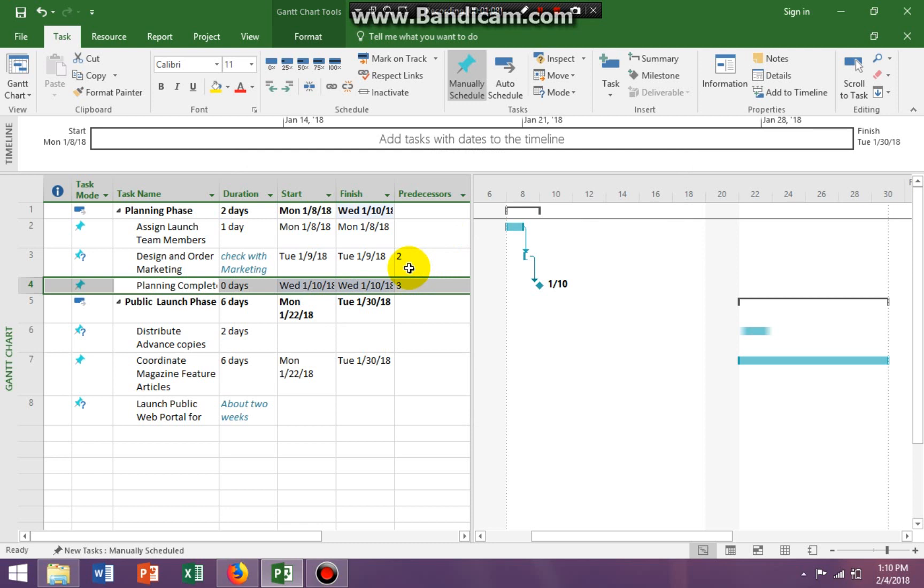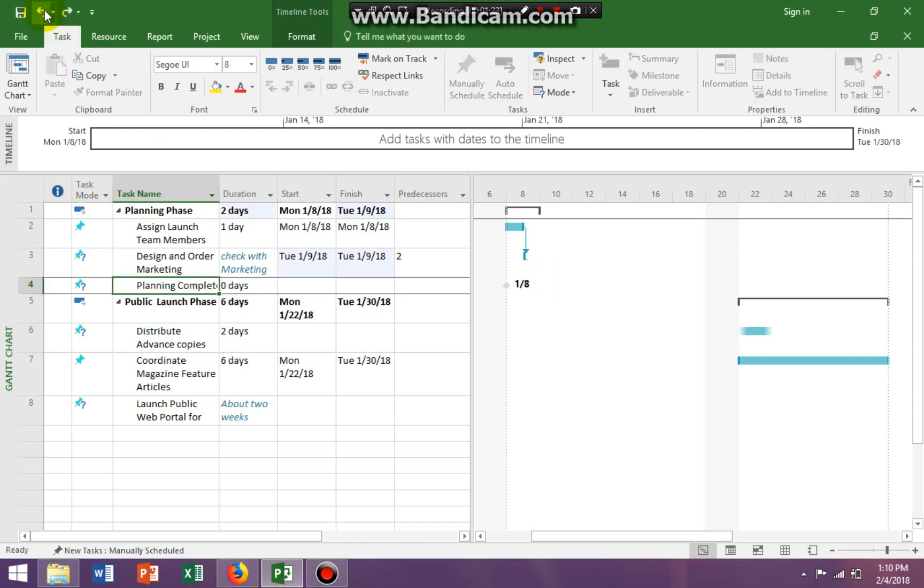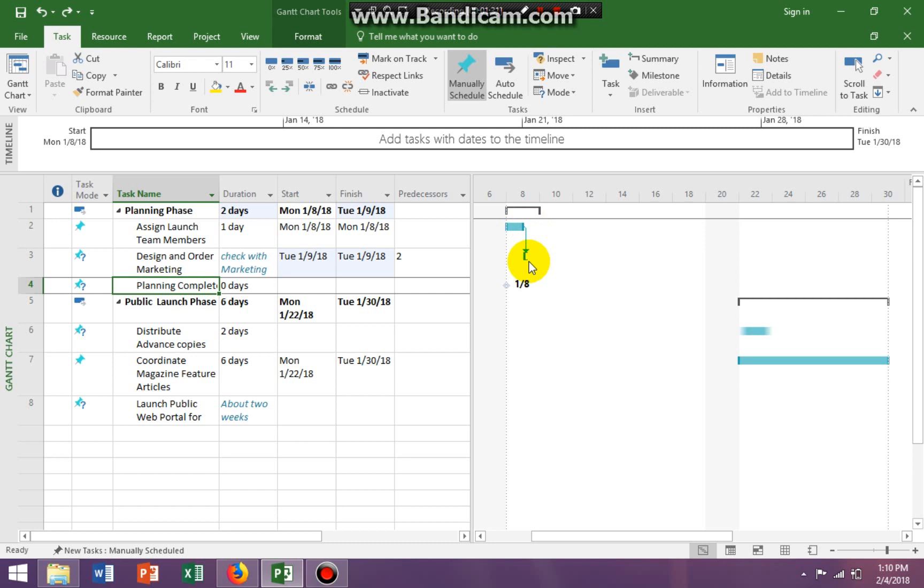Two is linked to three, they're dependent on each other. So when task two is complete, task three will start, and when task three is complete you'll have a milestone. Now I'm going to go back and redo this so we see - when task two is complete, task three will start.